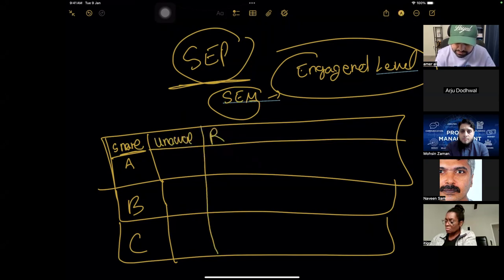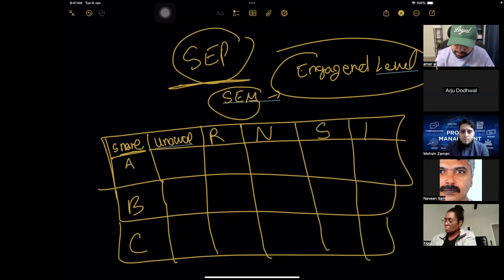I want to see, is he unaware about the project? Is he resistant about the project? Is he neutral about the project? Is he supportive about the project? Or is he leading about the project? What is his current engagement level? I'll give you an example.